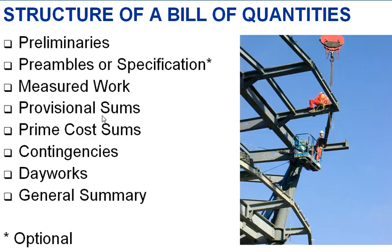Then we have contingencies, which is the sum of money set aside for additional works which are envisaged but which have not yet been agreed on. Following on from that, we would have a schedule of day works, which allows the client to see the rates that will be charged for items outside of the contract works — so that would allow us to price for labour items, plant items, and any other aspects of day works. Then at the end we would have a general summary which outlines the overall cost centres of the project.